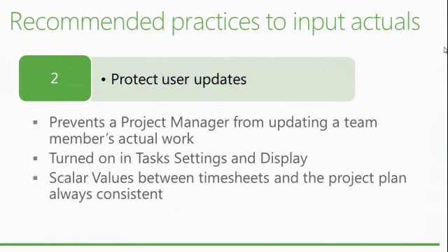All right, the second one is to protect the user updates. Typically you want to protect these updates because you want the updates that are entered by the resources who are logging their time. And typically that time has to match with, or is driven to, financial systems, for example. That's how people get paid. They have to report their time, either on project or non-project time. And at the end of the month, a financial system is going to add up all that and basically justify the salary that is given to the employees.